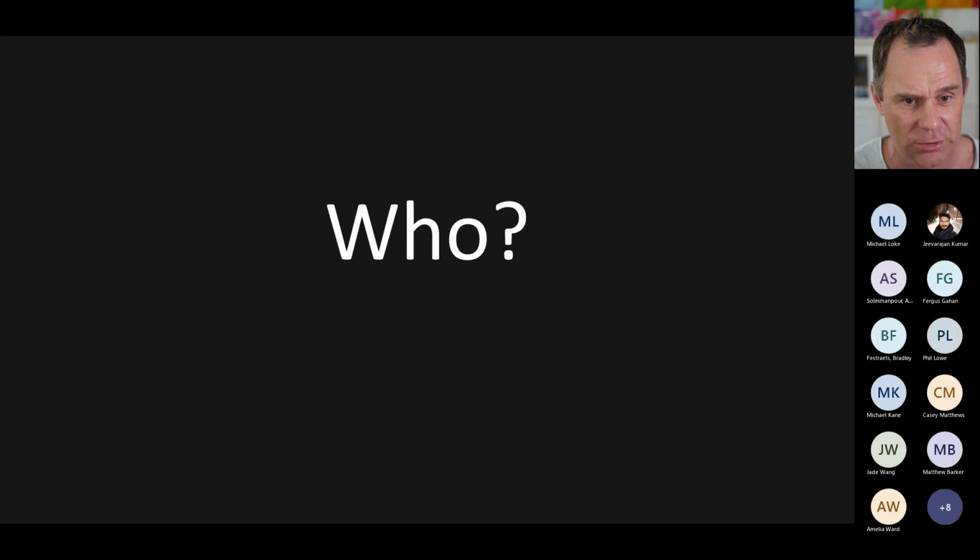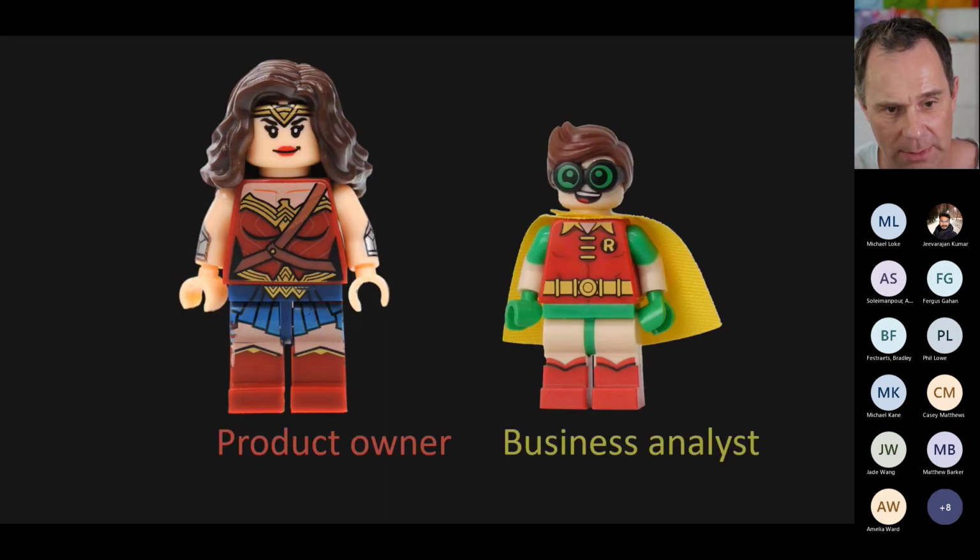So who's responsible for splitting the stories? Well, our product owner always remains accountable for the product backlog, and she can split the stories herself. But in my projects, in my Dynamics 365 and Power Platform, it's typically one of the developers, an experienced business analyst, who's managing the backlog on behalf of the product owner. He's accountable, but the business analyst is responsible.